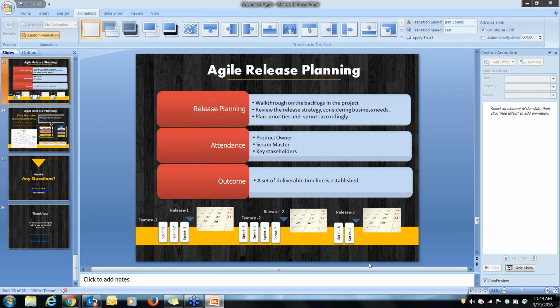They know, okay, we only have 2 weeks and we have to put in our whole 100% in 2 weeks, and there is no extension of it. Because if you already give the team the scope that we might change 2 weeks to 3 weeks, they might become lethargic in their work, they might try to push it, and they might not give their 100%. So that's why they say that every sprint should be time boxed. You can't go and extend it.